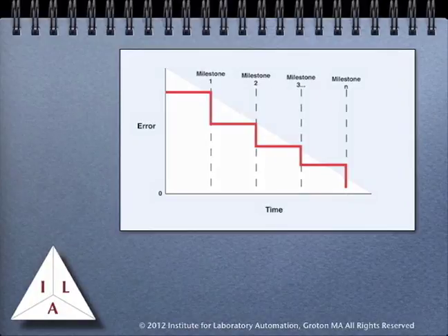You are going to have to address development schedules. If you ask people to give an estimate for the amount of time it's going to take to accomplish a certain task, they'll probably give you a number that's fairly ambitious. This is normal. People try to impress others with how quickly they can get things done, overestimate their capabilities, and assume 100% efficiency. None of that ever happens.